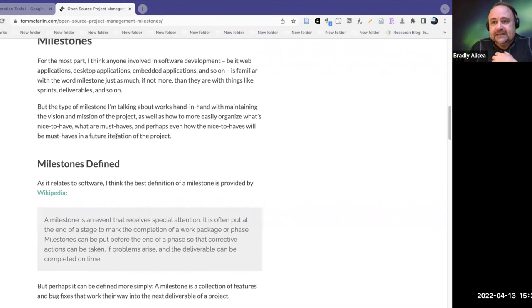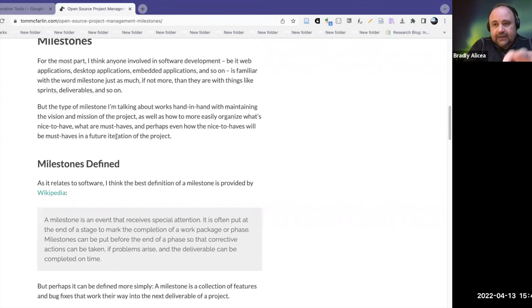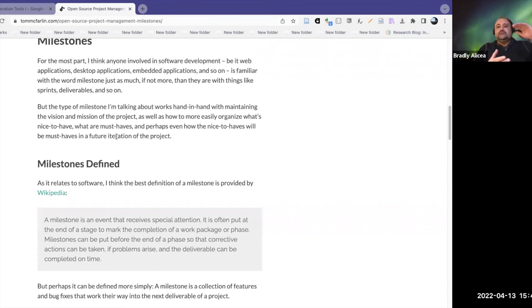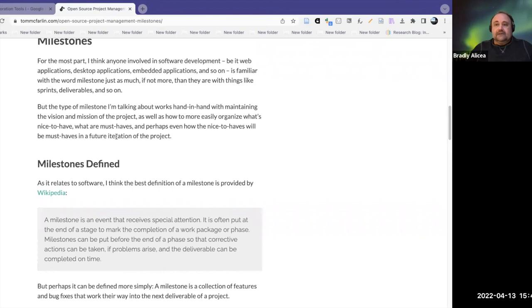You could prioritize your issues and epics in Zenhub into must-haves and nice-to-haves. There are things you may need very directly to achieve your goals, and things that are good to have but not critical. You can build this into the tools: in Notion you can have a list of critical and less critical components, then go to Zenhub or GitHub, work out a timeline, attach milestones and epics, and address the must-haves first. When you get hung up on must-haves, you might address the nice-to-haves in the meantime.